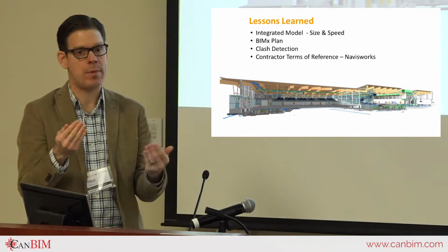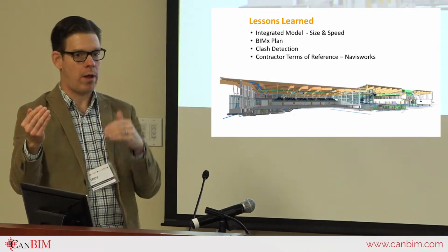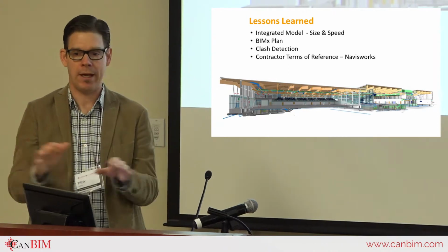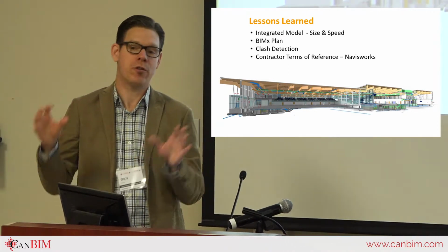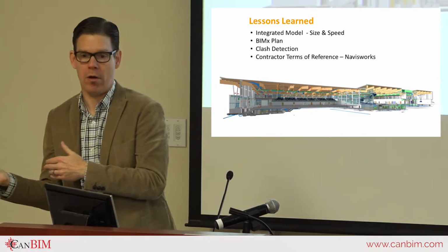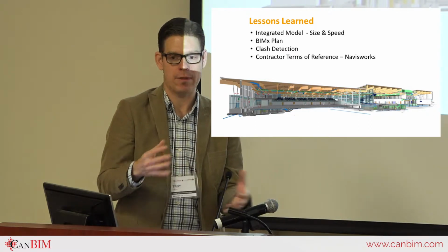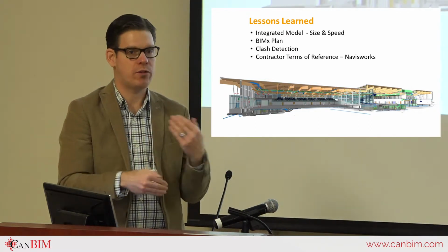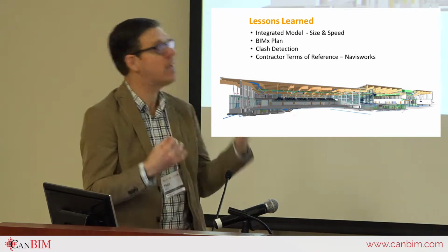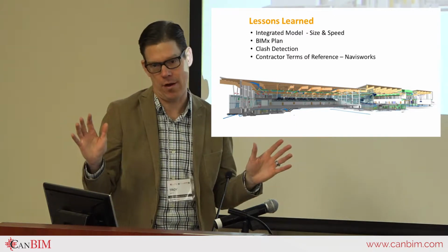And so there ended up being this kind of level of distrust, in a sense, between the model and the documents because we gave them the model to use. Even though we were very clear at the beginning, it's just for visualization, they tried to use it as well: I can't understand what's going on in this room. I'm going to go look at the model. And if I can't figure it out, then I'm going to blame the model or blame the document. So it became this kind of weird circle of disinformation and confusion because we gave them the model. In a sense, I feel like we shouldn't have given them the model. I think we would have been better off to not do that at the time.